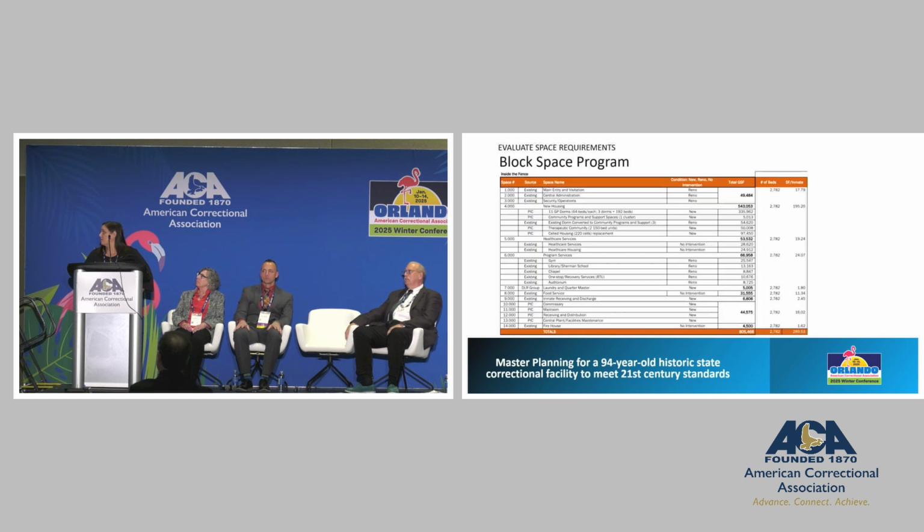But what that meant was that we were going to increase the population. I don't expect you to read this, but we didn't do detailed programming for this. We did some benchmarking. So we looked at some very recent programming they had done on other facilities, some programs that we had done at other places in the United States, as well as some spaces that they already had, to come up with a benchmark example of how much space they would need on campus to house the 2,700-ish beds, and that's a little over 800,000 square feet.